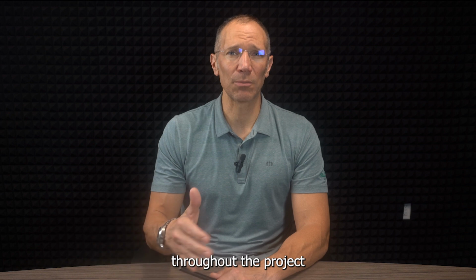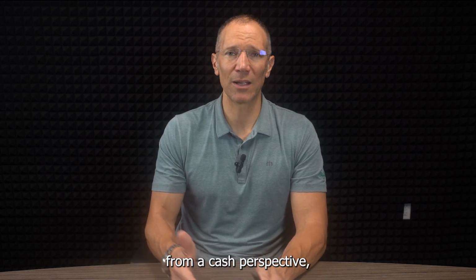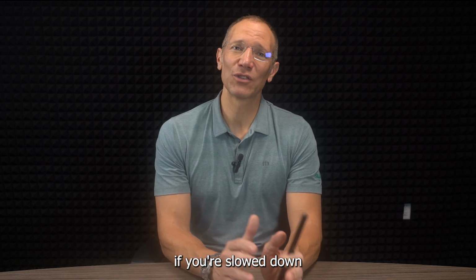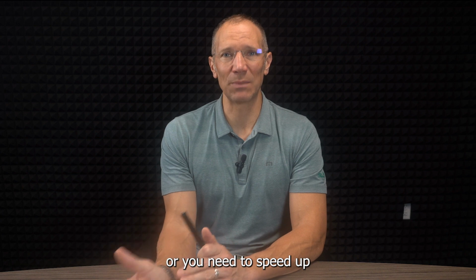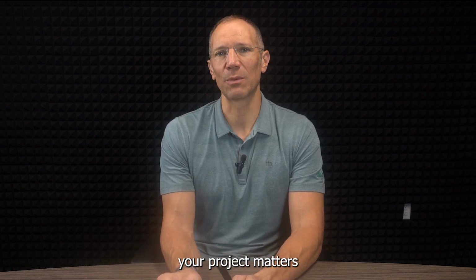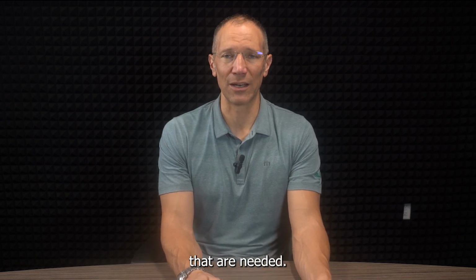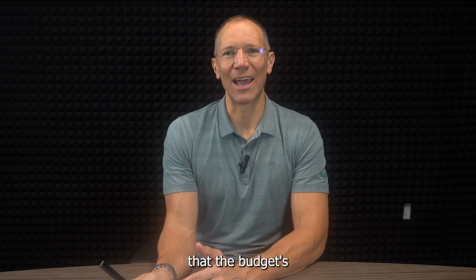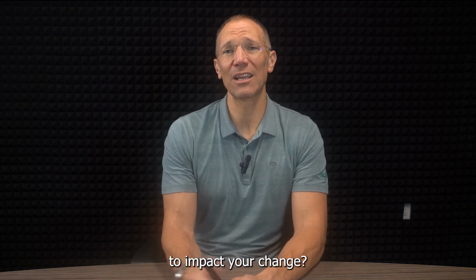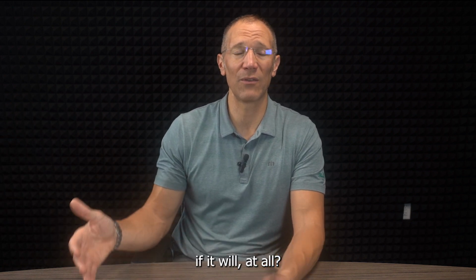But also throughout the project, you can update that, if not weekly from a cash perspective, then at a minimum every other week. The reason being, if you're slowed down or you need to speed up or the project's moving faster, you want to make sure your project manager is in constant communication so that your team can order the materials that are needed. Your accounting team knows that the money's going to be spent a little sooner than later. How's that going to impact or change the actual pay applications that are submitted at the end of the month, if it will at all?